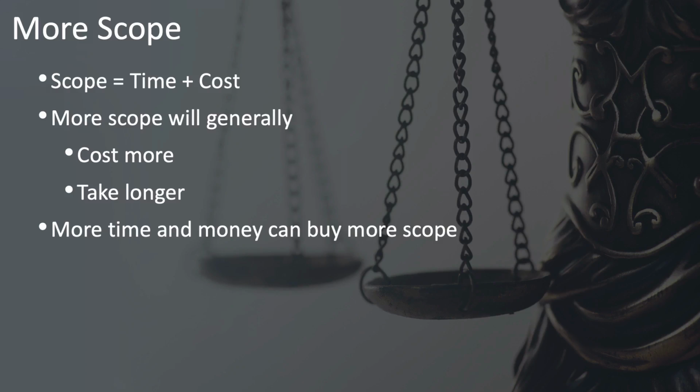In general, as a rough rule of thumb, more time and money on a project can buy more scope. For example, I once managed a project to develop a new system for a series of coal mines to manage the blending and shipping of coal. About halfway through the project, there was a change in the key users who were helping to specify the detailed requirements. And as a result of this change in stakeholders, they came up with a large list of changes in scope that were required, and this required more time and money to complete.